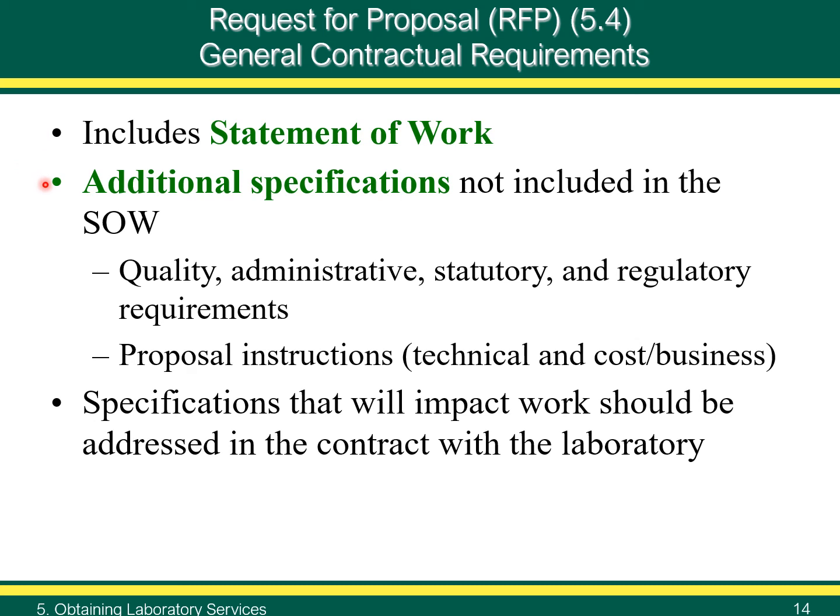Additional specifications not included in the statement of work may include quality, administrative, statutory, and regulatory requirements, and proposal instructions, either technical or cost and business related. In general, any specification that will impact work performed following award of the contract should be addressed in the contract.